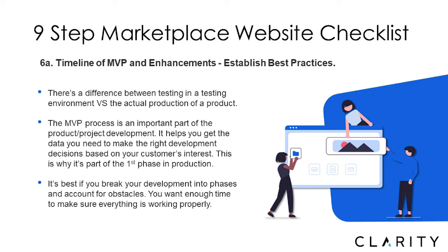And so the way Chris articulated the different phases, part of making those different phases on paper and able to help address these types of issues might be prioritizing them, right? Okay, well, here's the 27 features we're hoping to have in the panacea. This is every single one of them. You know, these 3, yeah, they're a dream. We doubt we're going to have them. We doubt we're going to be able to afford them. But if we could get them, man, that would be really cool. Great. Well, let's put that out there as the lowest priority.